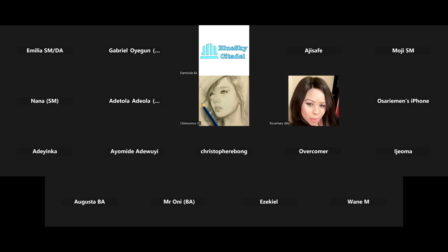It comes by default with 5, but you might have a situation where you have about 10 or 15 work items. It's not as if when those 15 work items are in that column, it's going to crash. But it would alert you with a red number. It's like saying 5 is carrying 15. That was why we had to change those numbers. By default it comes as 5, 5, 5, 5, and then we just increased it to 20 to be on the safe side, so that you don't start seeing red numbers on your board and wondering what is going on. So I hope that is clear.